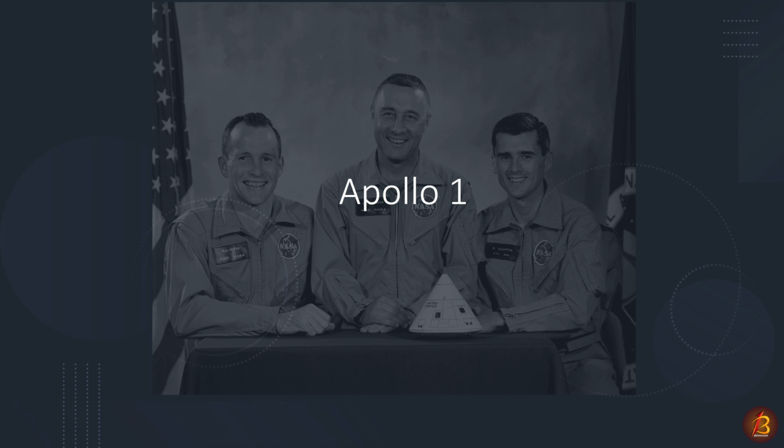In March, NASA was studying the possibility of flying the first Apollo mission as a joint space rendezvous with the final Project Gemini mission, Gemini 12, in November 1966. But by May, delays in making Apollo ready for flight by itself and the extra time needed to incorporate capability with the Gemini made that impractical. This became moot when slippage in readiness of the AS-204 spacecraft caused the last quarter of 1966 target date to be missed, and the mission was rescheduled for February 21st of 1967. So,